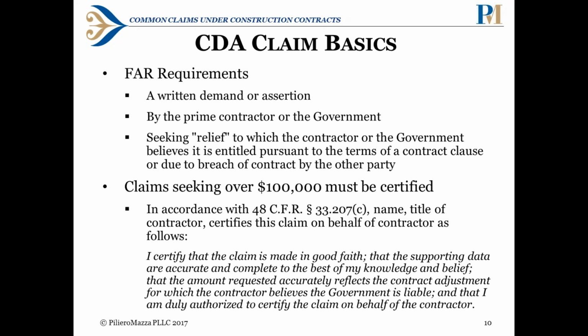Seeking relief to which the contractor or the government believes it is entitled pursuant to the terms of the contract clause, or due to a breach of contract by the other party, is the 3rd element in the claim. So that's where you say, I believe I'm entitled to X dollars or X number of days because, and that's your entitlement based on a FAR provision or the contract.